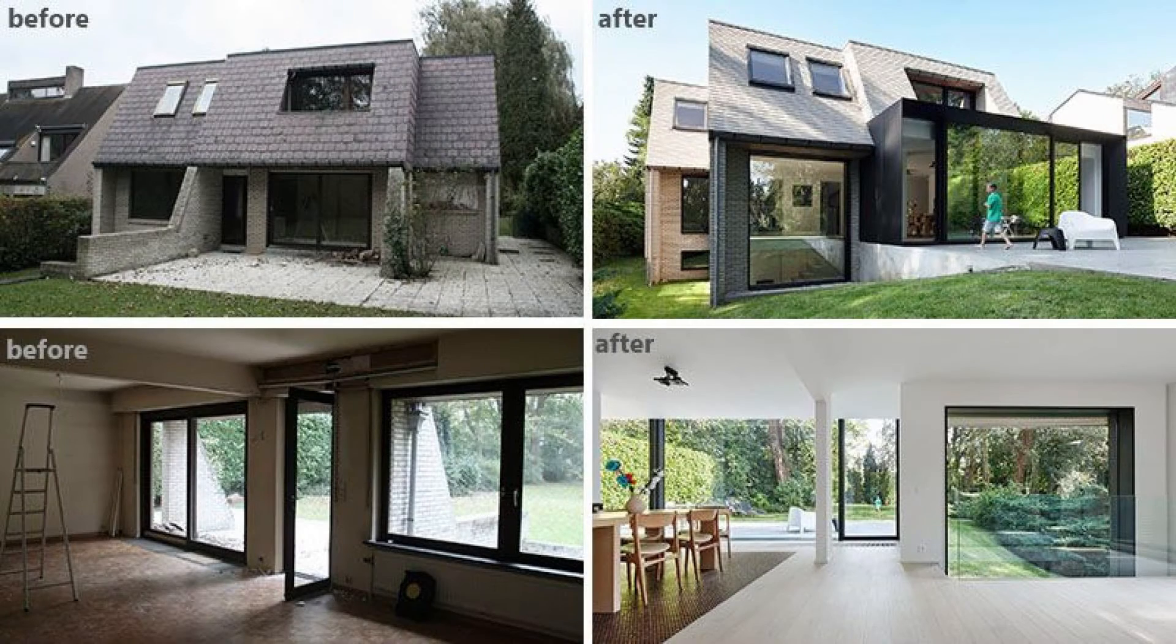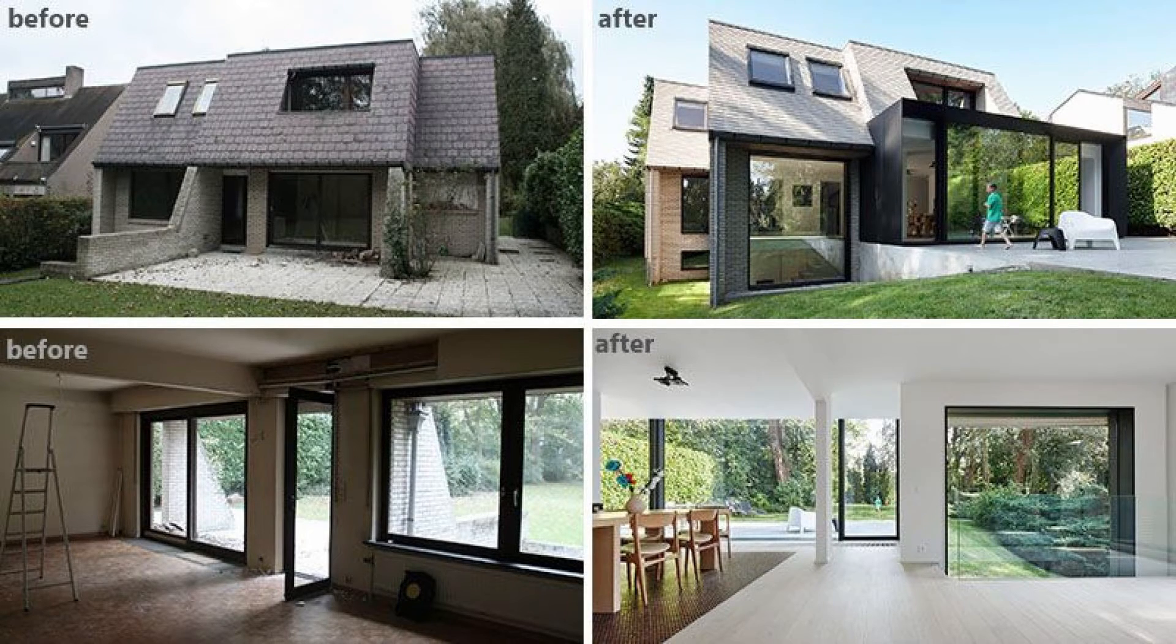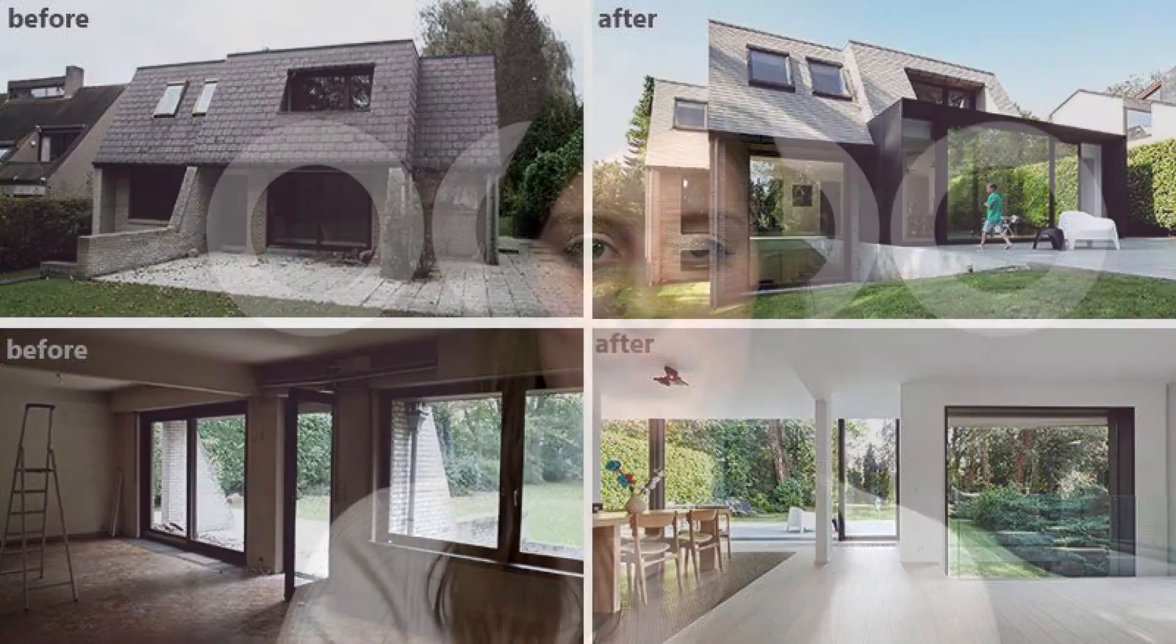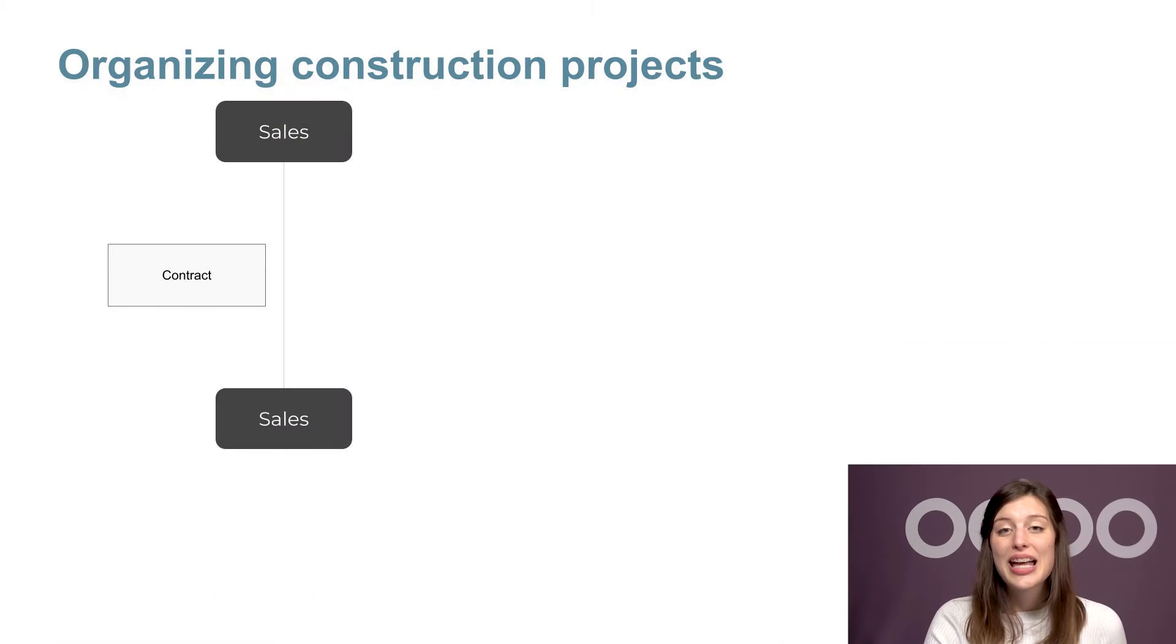From the salespeople who quote an invoice to the renovation workers, let's look at how Odoo helps coordinate the stakeholders involved in the project. It usually starts with a contract that defines the cost of materials and each profile rate—workers, subcontractors, etc. Once the customer agrees on the details of the project, the plans can be prepared, then workers will do the actual renovation based on those plans, and every month the project manager invoices the customers based on materials and days of work.